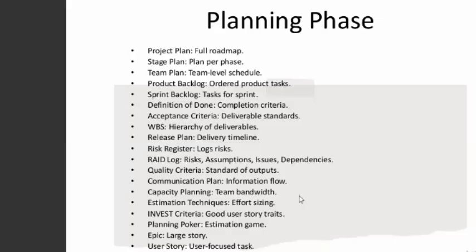So we also have what we call epic. Epic, largely used in Scrum. So an epic is just a large story. By story I mean user stories. User stories are a representation of users' needs. Oh, as a user, I want to be able to do this so that I can achieve that. So it's basically highlighting the different work activities that are related. So when you hear epic in delivering projects, it's work items that are related; you highlight similar user stories and then group them under one epic.